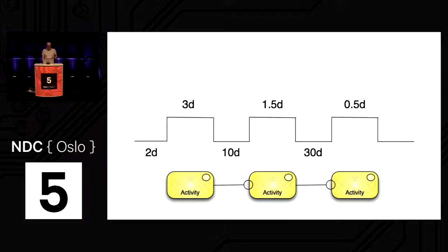client. So the middle one was development, so a developer writing some code. The first one was design, so some architects designing what the developer was going to do. And the last bit was testing. So of that, you've got 5 days of value-adding activity for a single piece of work.